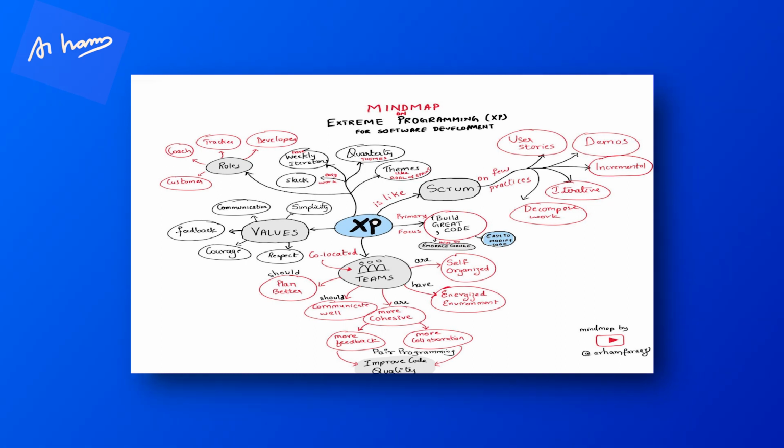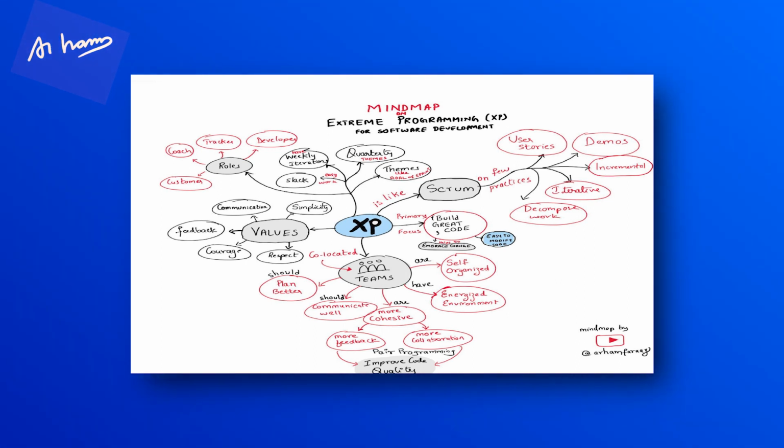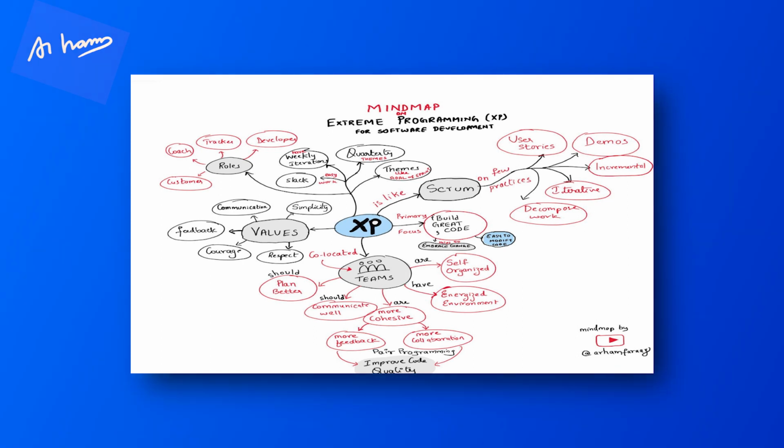Okay. Then in XP we have many ways of giving faster feedback. So we've got pair programming. In pair programming, you get feedback within seconds. Then after that you have got unit testing. With unit testing, every 10 minutes build you can get feedback. Then you have got customer collaboration, wherein you get feedback from the customer with clarification. Within a day you can get that feedback. Then the daily scrums give you feedback every day, right? Make course corrections. Then weekly sprints, you give a demo and get feedback. Then you have got acceptance from the customer within the week. UAT is done and you get feedback. Then the final release goes to the customer within a month, and you get feedback.